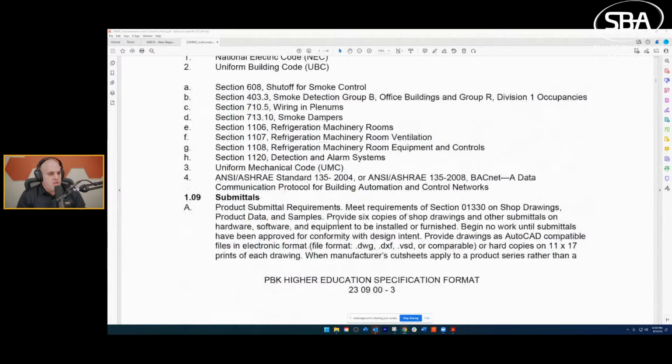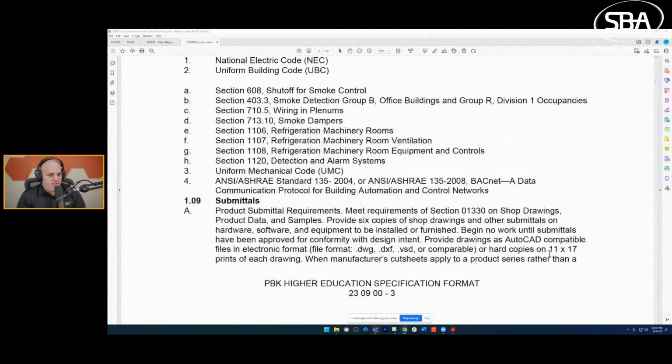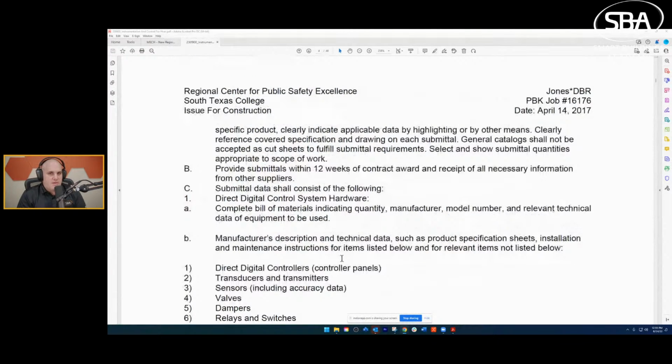Well, submittals, as I said, they're the first opportunity for you to go and make money, because once you submit, you can bill out typically. This is percent of completion, typically 10, 20% on the project. So you can bill out with this, right? I see your question in chat. I'll get to it in just a second.